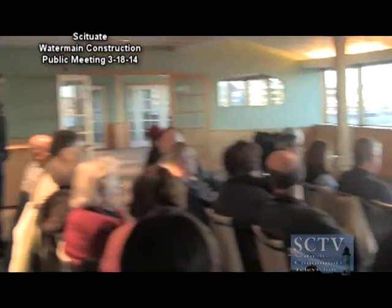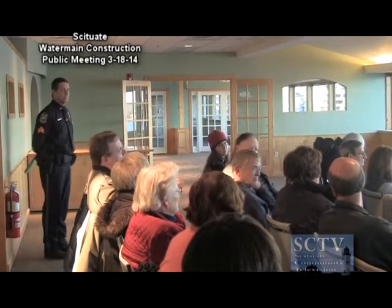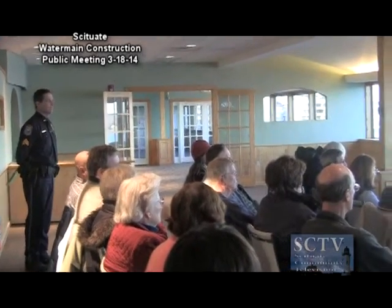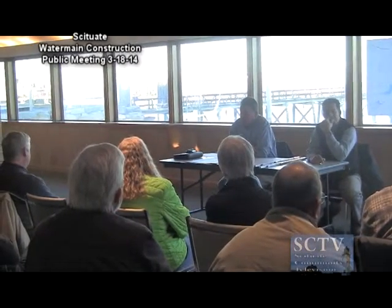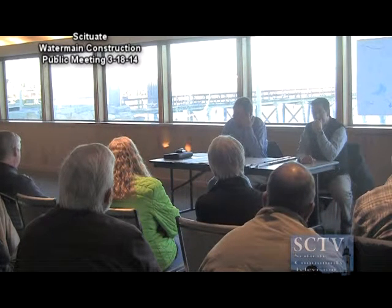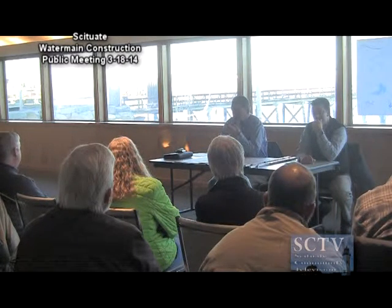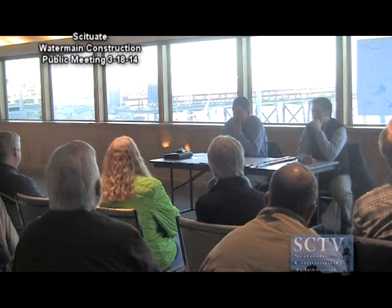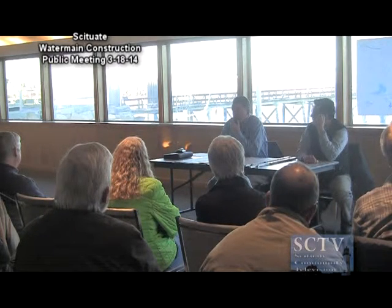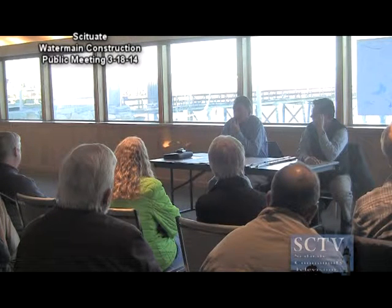The July 1st projected end date, what constitutes the end date for you? Is that paving of the road, or is that just the contractor's out? No, the contractor will be out, completed with the water pipe. What he'll do is hopefully have a temporary asphalt patch down at that time. We will leave the asphalt patch in place. There'll be miscellaneous settlement over this. We know this from past practice. They'll maintain that trench, and then we'll probably wind up paving it either later in the fall or maybe even the following year. We'll let it settle almost a full year just to get it all cleaned up.